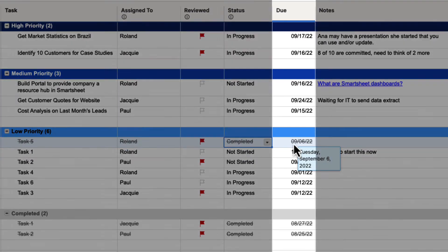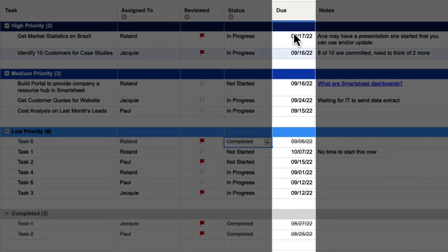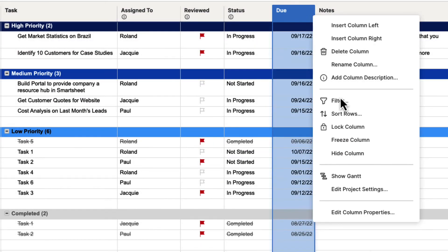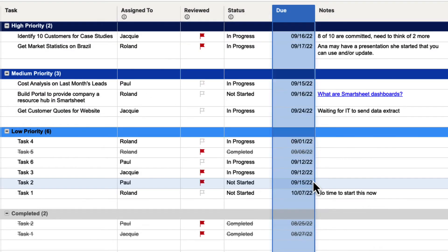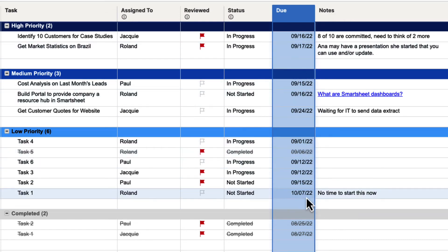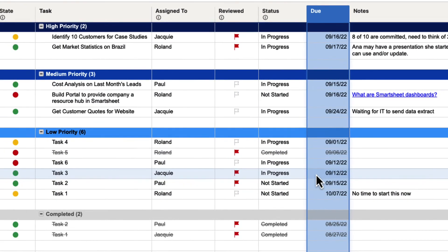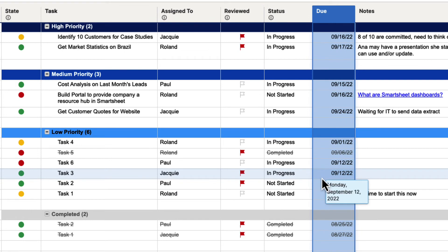The same applies to dates — you can sort dates in ascending or descending order. So if we put Due Date in ascending order and hit OK, it will sort those within their parents in that ascending order. That is how we sort information inside of Smartsheet.